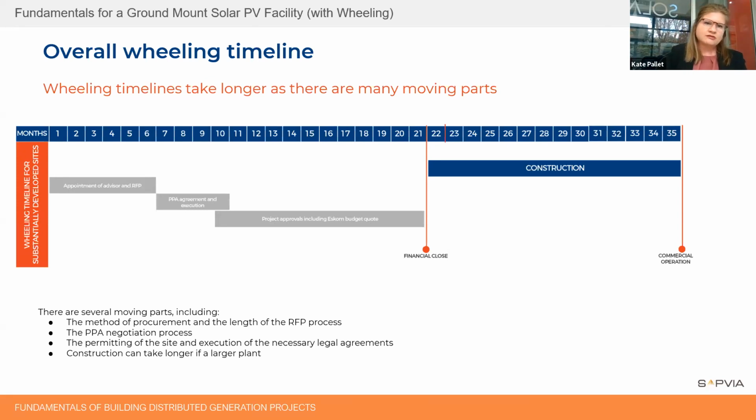Then it'll be about 4 months, optimistically, to get the PPA agreed and signed. There is a bit of PPA negotiation that always happens. It usually also needs some more detailed design work in order to understand how much the plant can output, etc. And typically these things affect the PPA and the way it's arranged. So that negotiation process can take quite a long time.